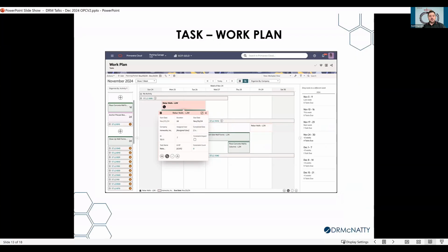Obviously it's part of the last planner, the Lean Construction Institute. But what we're essentially proposing here is you're taking an activity, say we're doing vertical construction, it's repeatable work. So we have a set of activities and then we have the associated tasks with that. We can link those tasks through what we call handoffs. So essentially, this is the hopper view. Left-hand nav is where all my activities and tasks live. And I'm simply dragging and dropping onto the screen.